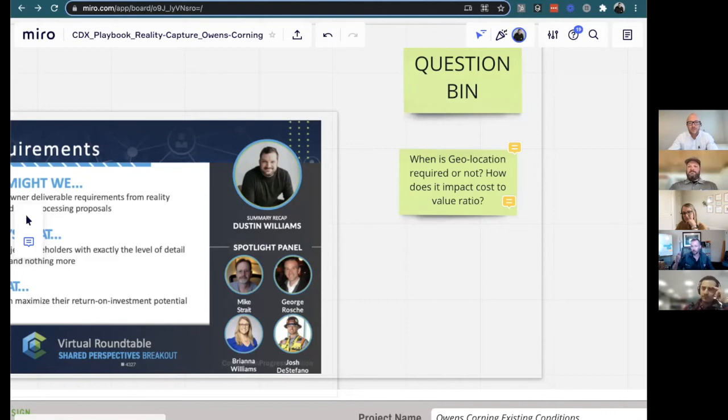I only say that because we did the same thing with verification. We had three dormitories that we did prior, and then we had around 600 issues on average on the last dormitory. Then on this new one, the same building, we went from about 60 issues on the first pour to 12 issues, then 5 issues, then 3 issues, and 0, just by doing verification. And then we finished the job two weeks ahead of time.